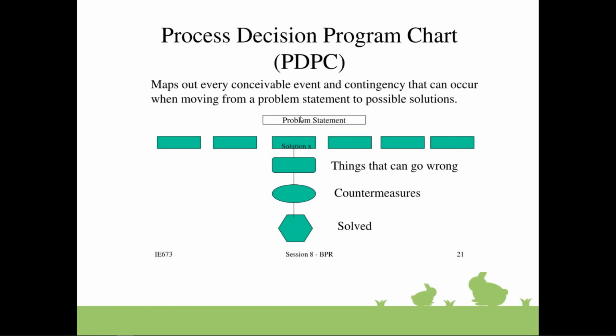Then you identify countermeasures for each problem and add them below each applicable problem. And then, on the last step, you consider whether it's practical to apply each countermeasure in terms of time, resources, cost, etc. And you can mark practical and impractical solutions as such. Then you can do an analysis of solutions that can be approached and solutions that are too impractical to approach.